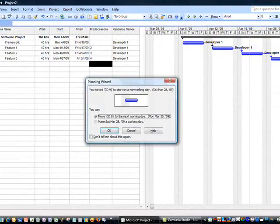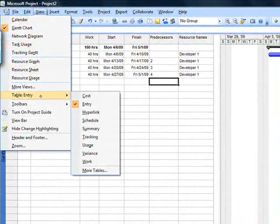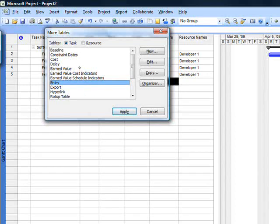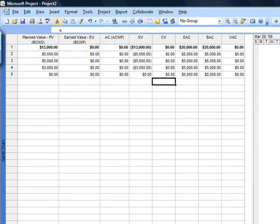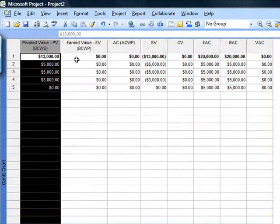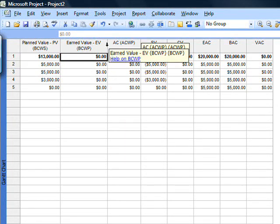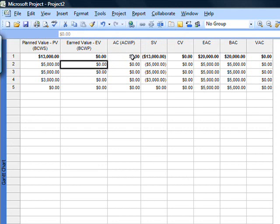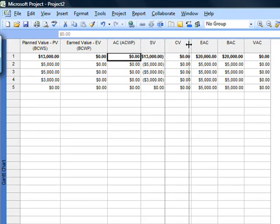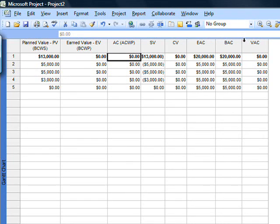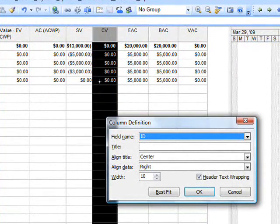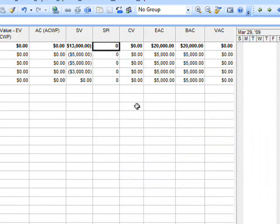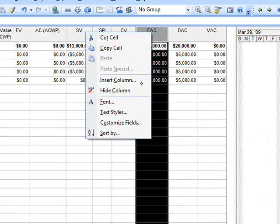Now, once we've done this, let's go look at our earned value numbers. Go to View > Table > Entry and change it to Earned Value. We've got some useful numbers here: Planned Value, Earned Value, Actual Cost, Schedule Variance, Cost Variance, Estimate at Completion, and Budget at Completion — or as Microsoft Project calls it, Baseline Cost — and then Variance at Completion. I want to insert a column here for Schedule Performance Index, which I've found to be very useful, and also Cost Performance Index.